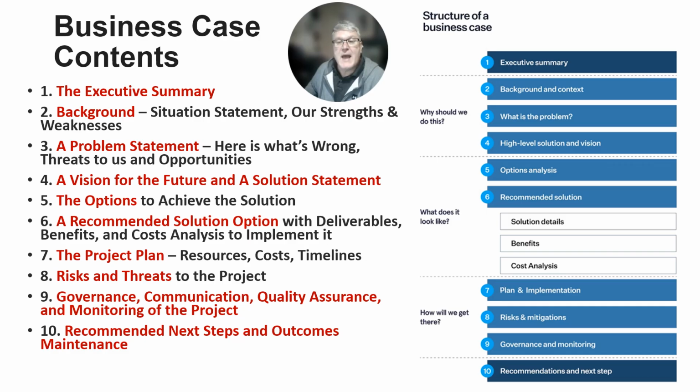There needs to be some background. In the background for the business case, there needs to be the situation statement, and a discussion of the strengths and weaknesses, not only of our organization, but of the project and things of that nature. There needs to be a problem statement. There needs to be a statement saying, here's what's wrong, here's what threatens us or provides us opportunity to enhance our organization. There also needs to be a vision for the future and a solution statement.